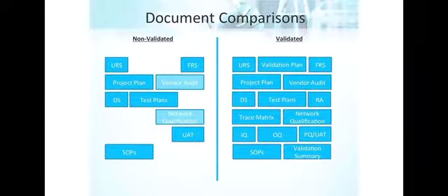But what's that thing between them, a validation plan? Well, in the life science space, you may have user requirements, but before you start building your functional requirements, you have to have a validation plan that says, here's what I'm going to do. In that, you need to list the steps and the documents that need to be generated, and that is your entire plan for what needs to be performed, executed, tested, and then closed at the end.